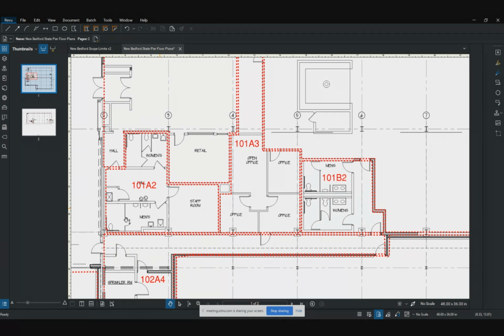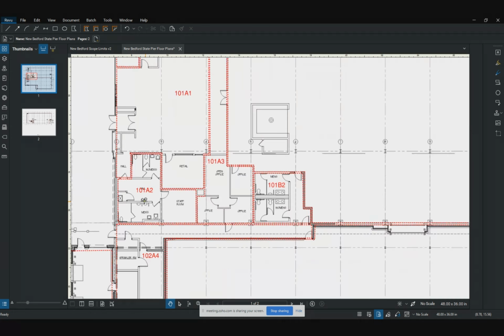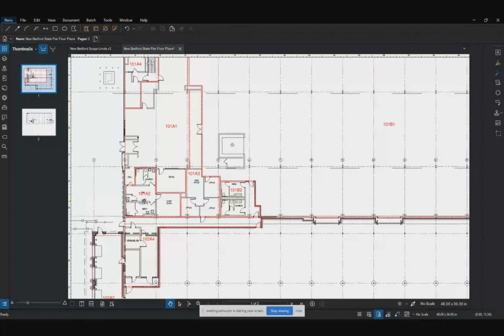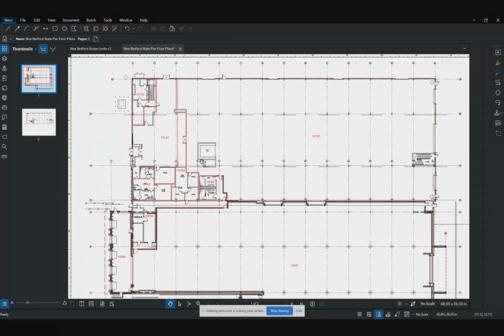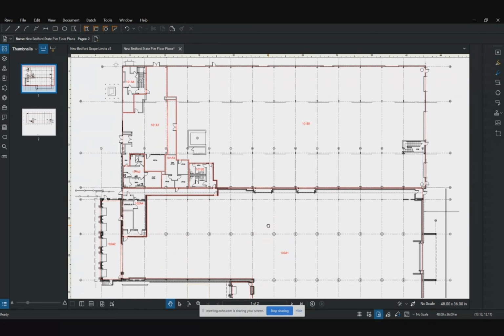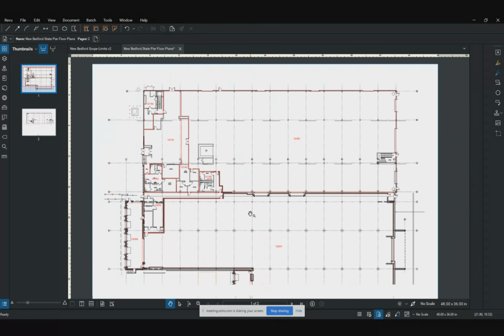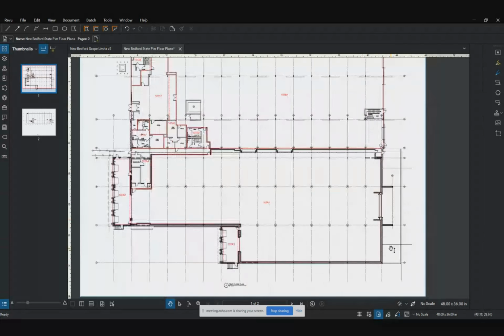Sometimes, though, they do count, and if they have the numbers, we'll use the numbers because that's more accurate. But if we don't count it, then we just do it by square foot. Some things I can count pretty easily. Like in this floor plan, I can see all the doors, so that's easy to count. I will count those. I won't do the doors by square foot.